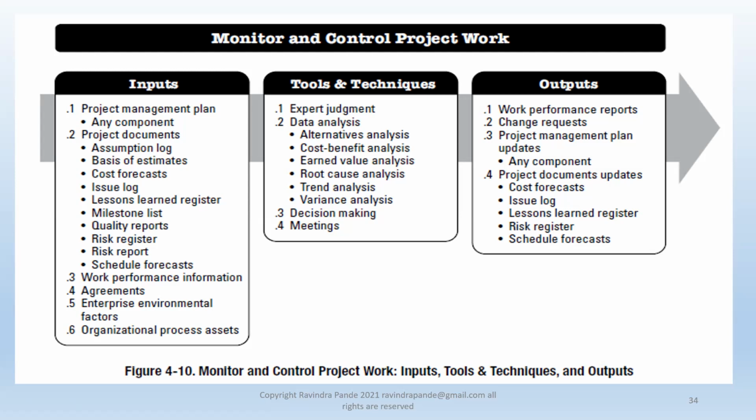When it comes to lessons learned, we concentrate more on what we did to make things efficient. When it comes to risk, we normally concentrate on any issue materializing. Let's say a snowstorm comes your way and paralyzes your region for 2 days. This is a kind of risk materializing. But whatever you or the previous project manager planned to address such a scenario could be used to mitigate that risk and absorb the shock of it materializing, and we can refer to the lessons learned register for that. So there's a distinct difference between those two.